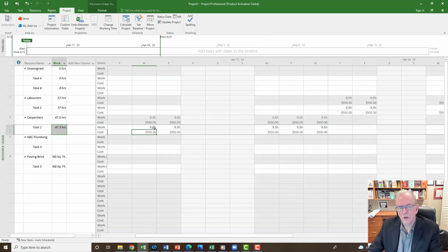Remember, we made it $100 a day, so it's very easy to calculate. So 9.5 times 100, $950. Just so it's visual for this video that way. So now we've set our days for 9.5 hours per day. So every time we add a day and we assign somebody that's an hourly worker that's listed as work, then it will do that multiplication at 9.5 hours.